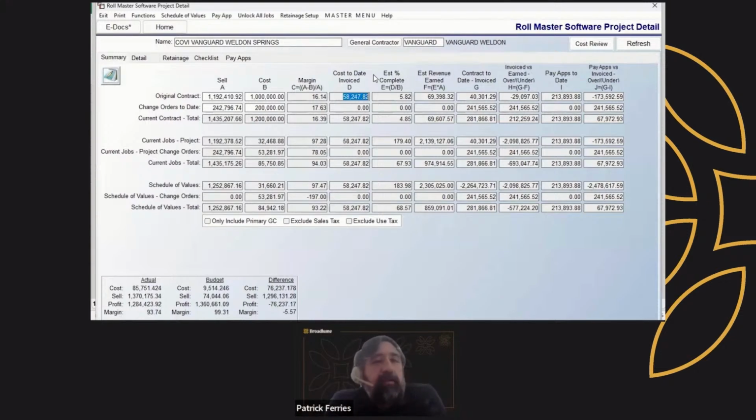So your invoicing is what drives this column, invoicing out jobs, and it's the cost we're worried about here, not the sell. So on those $0 operational jobs, I still had material and labor. And as these phases of the job or units get complete, I'm invoicing, and that's driving this column.